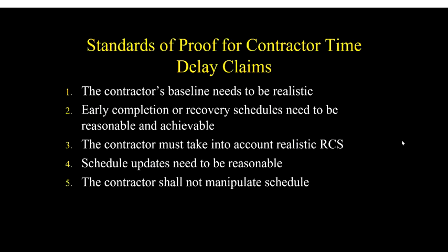And number five, it's very important for contractors to realize that any claim that is prepared for a time extension is going to be subjected to cross-examination by the opposing party, which means that during that cross-examination, the other party is going to be looking for potential errors in the baseline schedule, potential errors in the updates. Sometimes those errors are intentional, sometimes they are not.